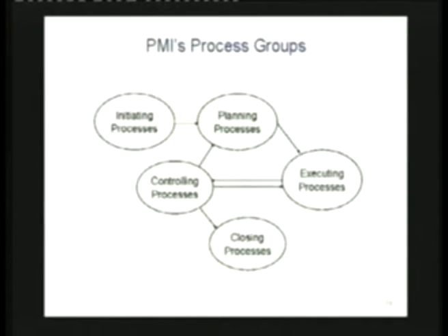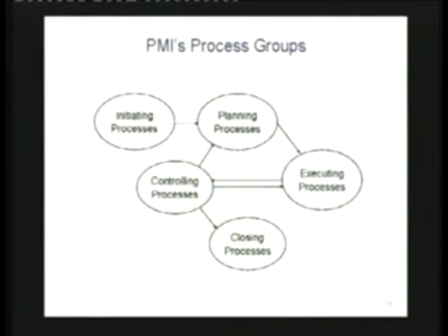Exactly. What would these individuals be doing? The different domain experts, what specific things would they be doing? Tell me something between the initiation of the project and the planning. What is there in between these two groups? That is the first part. What is the first part? I've got the charter there and the scope there. The site deliberation and the procurement will come in planning. But initiation is clarifying the scope and also working out the work breakdown structure. Those things have to be done before you actually begin your planning.